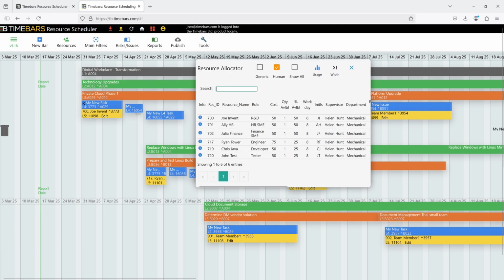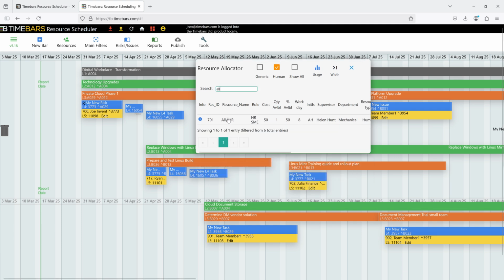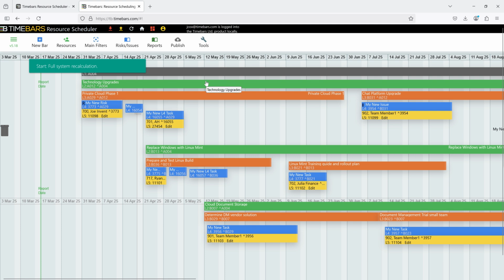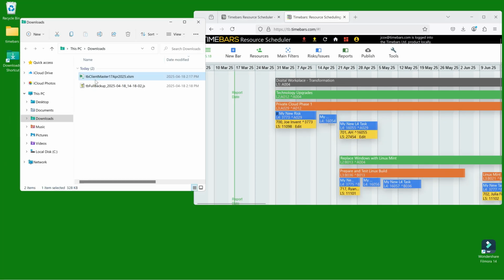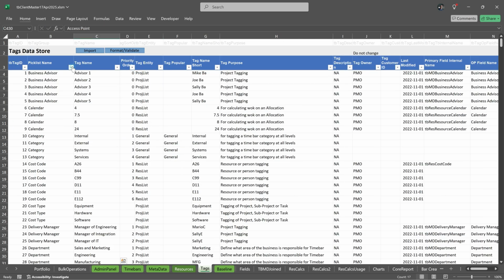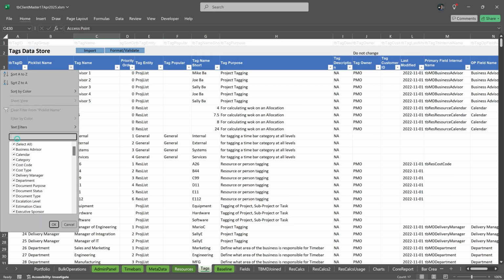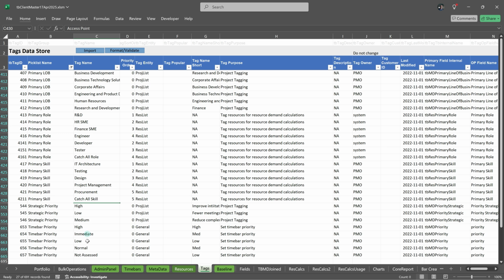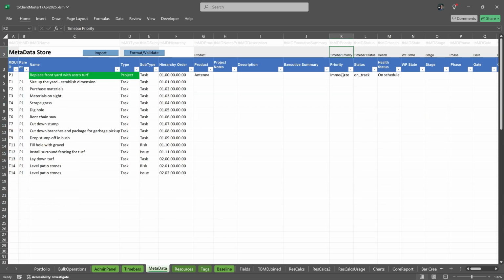Oh, absolutely. It's more than just convenient. It gives you that visibility across all your projects. Helps avoid overbooking people, make sure the right skills are actually free when you plan to use them. Okay, makes sense. And the metadata part, it mentions a tags table. What's the deal with that? Well, think of it like custom labels for your projects. You set up attributes, whatever's important for you to track, and you can use those to organize and filter your projects. By department or strategic initiative or risk level. Exactly. It moves beyond just simple folders. Could be really powerful for reporting later on.